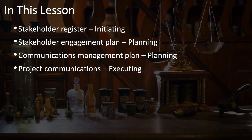This lesson combines stakeholder and communications documents because they are so interrelated. We start with the stakeholder register, which is created during the initiating process. Then the stakeholder engagement plan and the communications management plan, which are done during the planning phase.